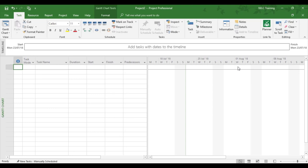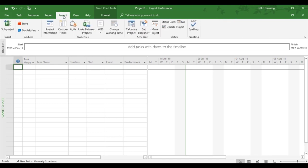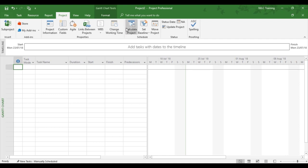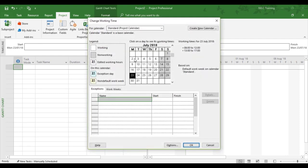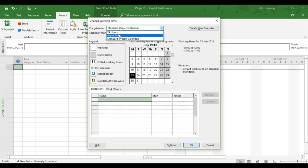We've now got to go into the Project tab and use an area called Change Working Times. Now by default, project comes with three calendars: 24 hours, night shift, and standard calendar. Well, standard calendar is what's set the project now.